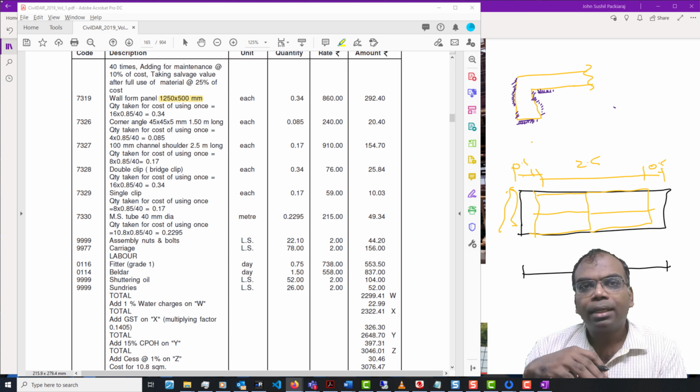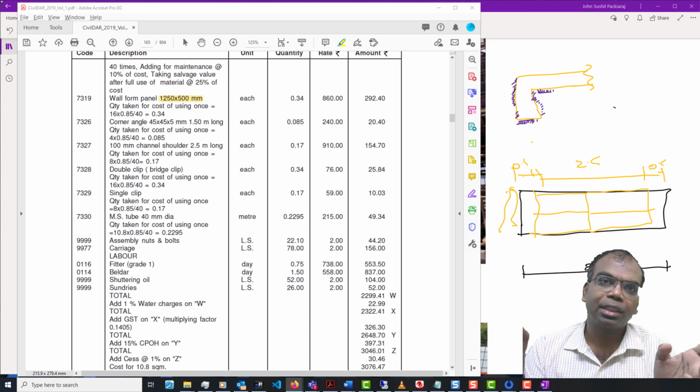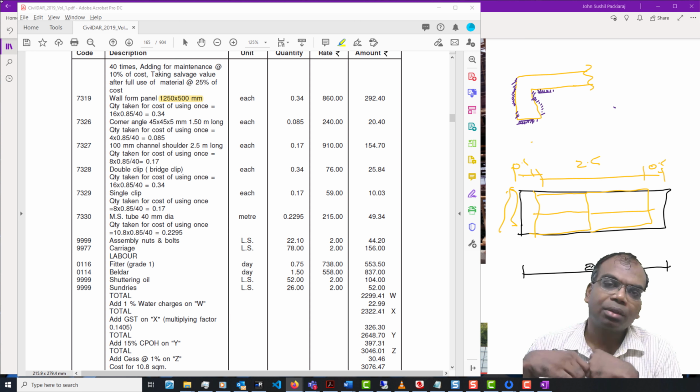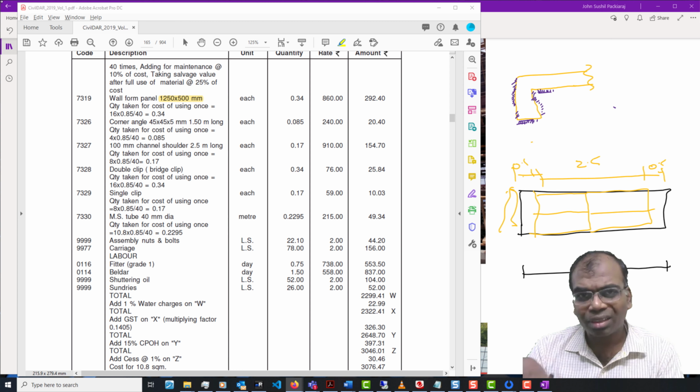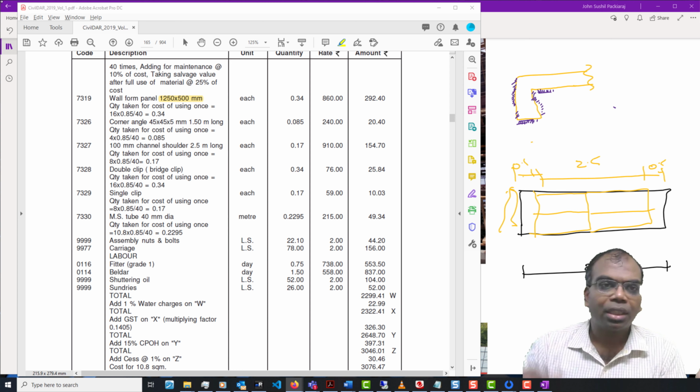Okay, and the lifting of the reinforcement is many times done by the tower crane. The tower crane lifts it and keeps it at the place where you want it, if a tower crane is there. And once you do it, the placing of reinforcement is still manual, and after that they check it, and only after that, maybe the first operation is keeping the shuttering box.